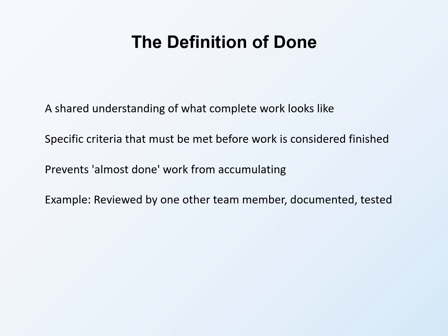The definition of done deserves special attention. It's a shared understanding of what complete work looks like. Without this, teams often accumulate almost done work, tasks that are 90% complete but never quite finished. The definition of done specifies criteria that must be met before work is considered finished.